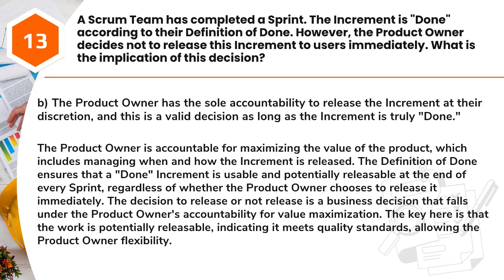Answer: B. The product owner has the sole accountability to release the increment at their discretion, and this is a valid decision as long as the increment is truly done. The product owner is accountable for maximizing the value of the product, which includes managing when and how the increment is released. The definition of done ensures that a done increment is usable and potentially releasable at the end of every sprint,